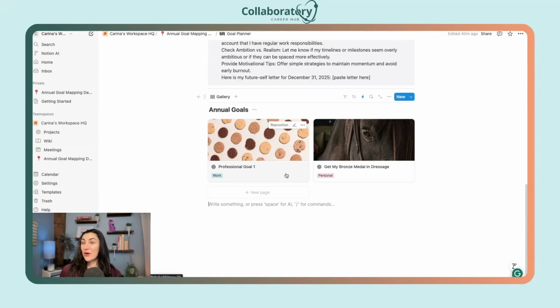This is how you're going to go about it. You're just going to go goal by goal, quarter by quarter, milestone by milestone, and break it into chunks. This will take several hours. I will be transparent, you need to spend half a day doing this. By the end, you're going to have an entire roadmap. You're going to know when things need to be done, and it's going to be very simple for you to just follow the plan. And that's what you want. You want to take the thinking out of this. This is the time to think. Once that's done, you are doing, you're executing.